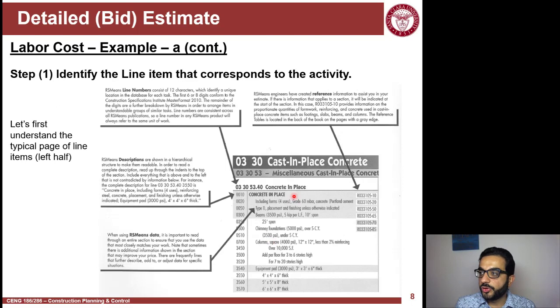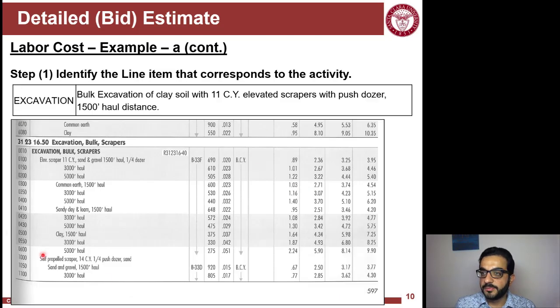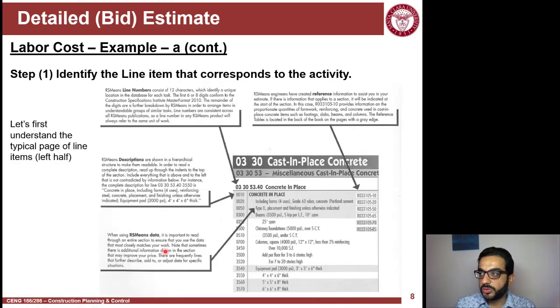So let's move to the book and see how the pages are organized. This is half of the page. Like you will see, the page is like that, so I'm showing half of it here. Going back here, remember our detailed cost estimate follows the CSI MasterFormat. The square foot data or cost rate follows the UniFormat. So UniFormat versus MasterFormat. You need to know the difference. UniFormat is mostly for square foot. MasterFormat is for detailed estimate.